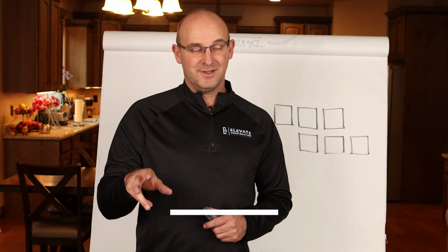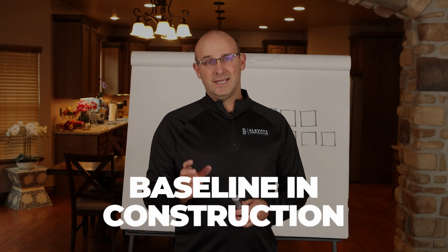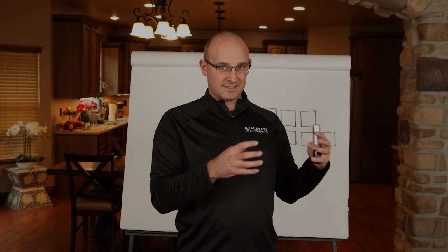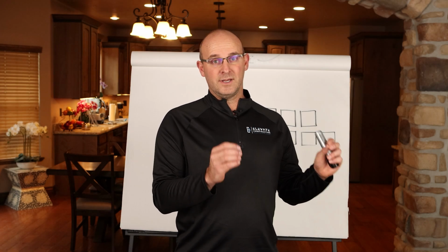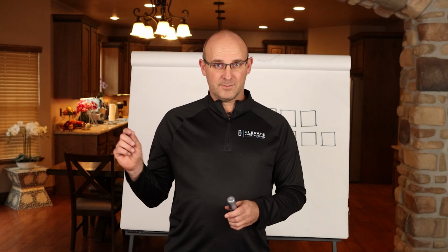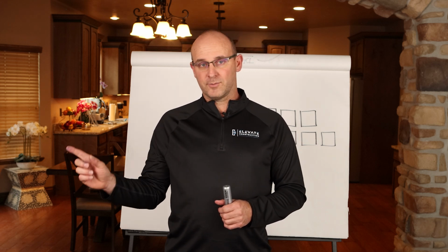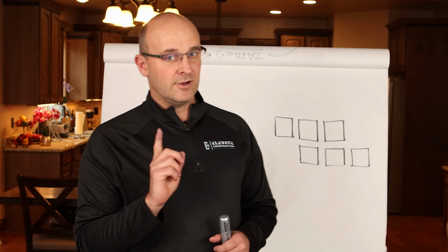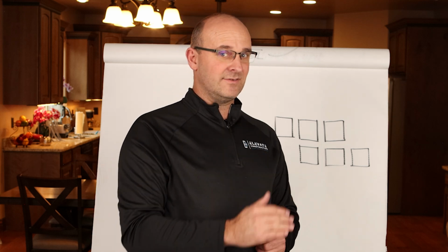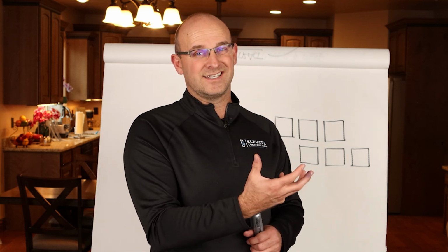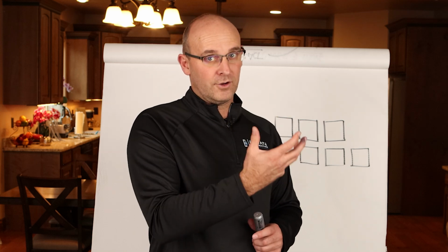Okay, so now it's mad time. You've heard a lot about a baseline in construction. The way a baseline works is it basically sets the target plan, the baseline plan for that project. It says, this is literally what we're going to compare your progress to. Now, in most applications, there's an activity ID, which is the basis, in addition to the activities and the logic ties, for your baseline.